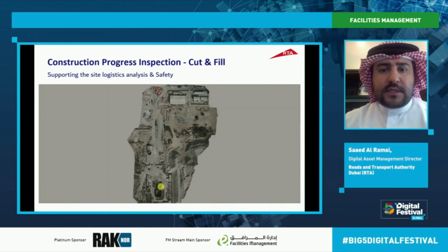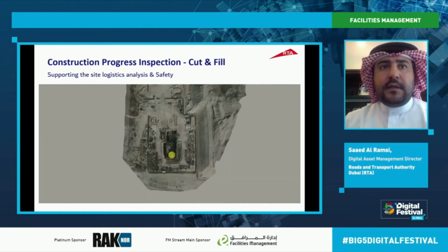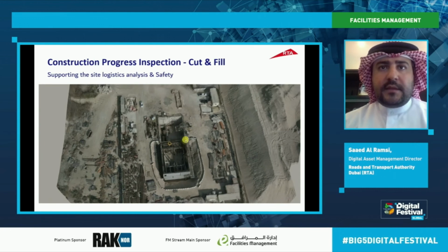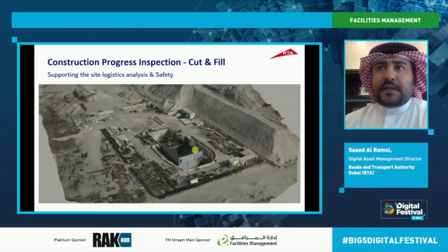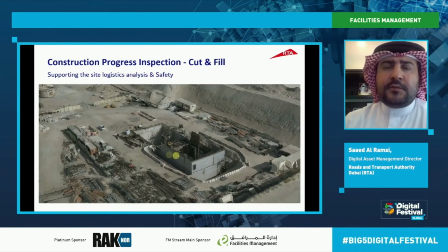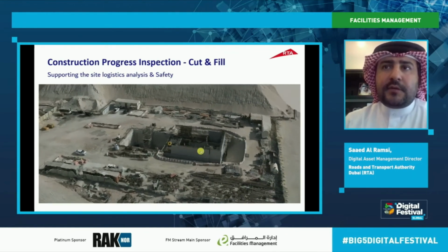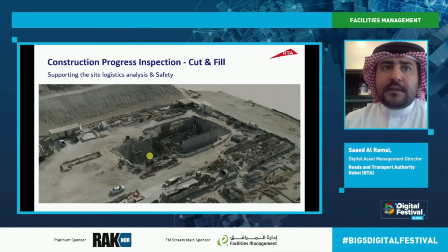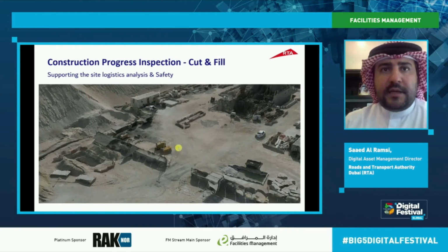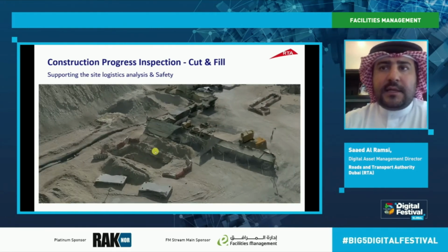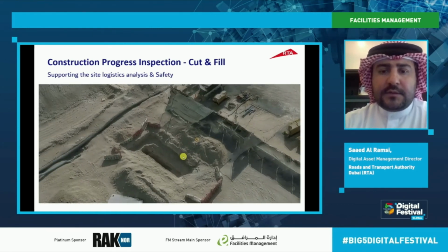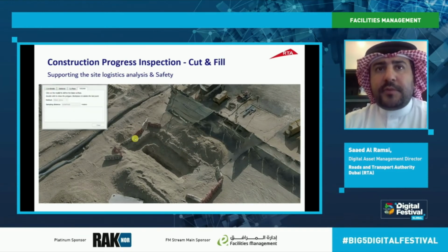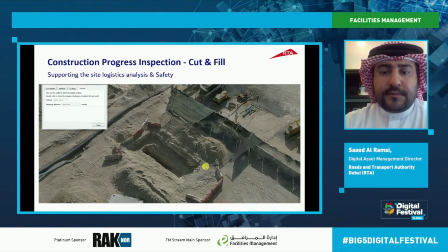This slide, construction progress inspection, cut and fill. Using the drones to gather the needed information for the cut and fill activities during construction stage, which supports getting accurate calculations for the materials. This was helpful in supporting the logistics analysis and for safety. So these were accomplished also by using the drones.